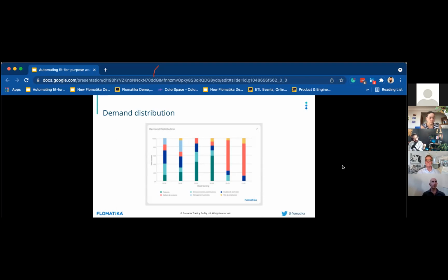So sometimes I might be under what is expected, so next time I pick up work, I'll try to focus on that type of work that I'm under. Or I might be over, and next time I'll try not to pick that type of demand and pick something else that's under. So understanding this will be really important and game changing for delivery governance.